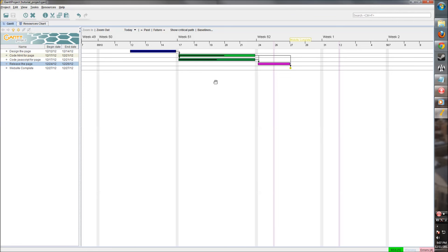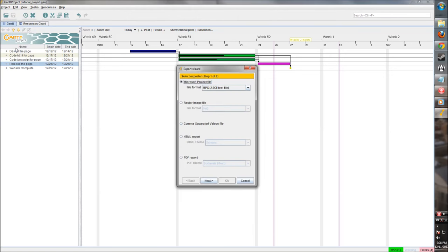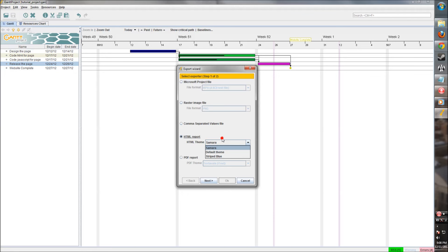So now, one of the other great things about Gantt project is that you can export it to a Microsoft project file, which is extremely helpful if you are working with somebody else who maybe likes all of the extra features and budget managing and everything else that comes with Microsoft project, whereas you only need a lightweight solution, which is what Gantt project is. So we can go in here and we can export as a Microsoft project file. We can also export as an image. If we just need the chart, we can export as a comma separated. We can export as an HTML report and a PDF, which is all extremely useful. So let's export as a Microsoft project file.